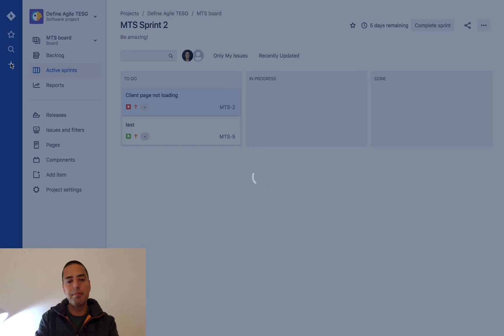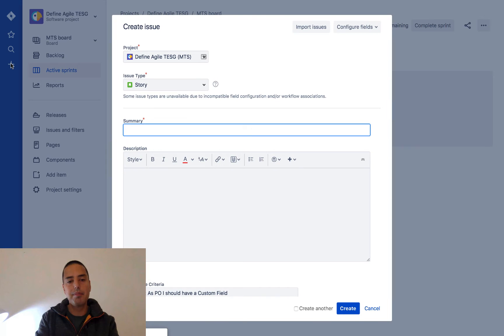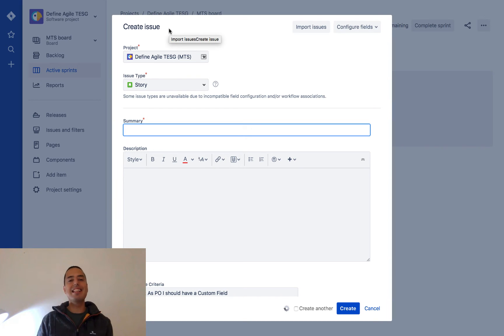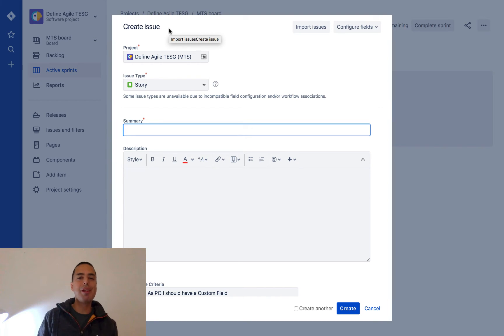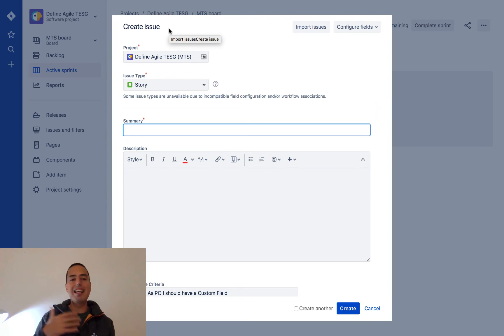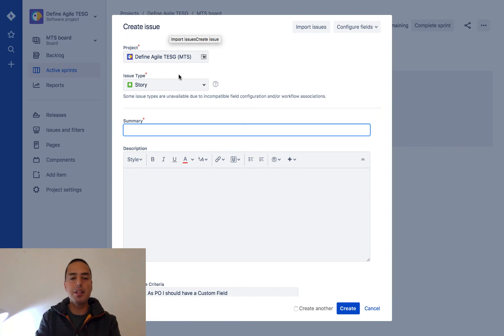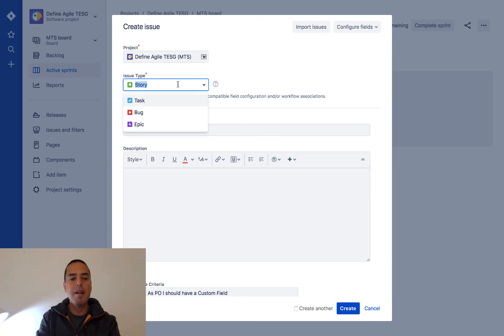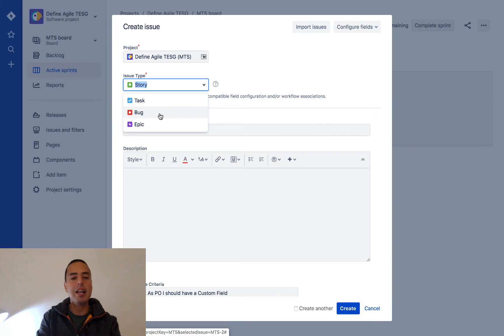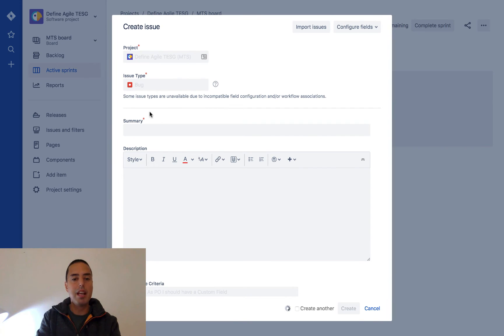Here it says create issue. A bug is a type of issue, which most people don't know when they start with JIRA. You are creating an issue, and your issue can be either story, task, bug, or epic. Today we're logging a bug, so we click on bug and our issue type becomes bug. Then we need to provide a summary - what is this issue